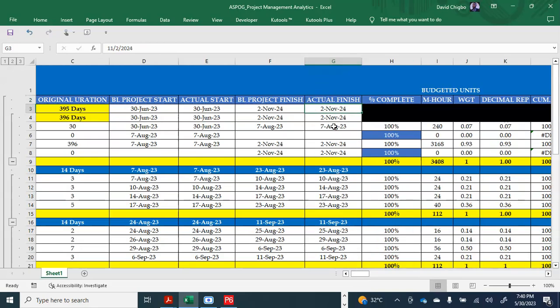Okay. So can we say baseline start was as planned, the day you would have started? Yes, but actually you didn't start that day. You delayed by maybe one or two days. Then that becomes your actual start date. That's just what it is. That's why I had to keep baseline start and actual start. So if you now want to see the difference,